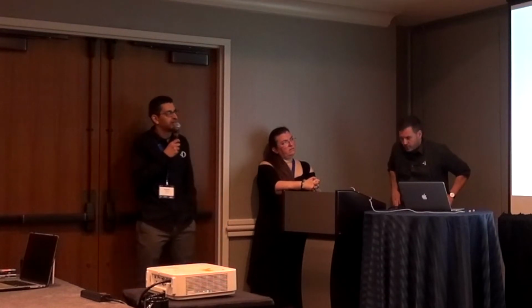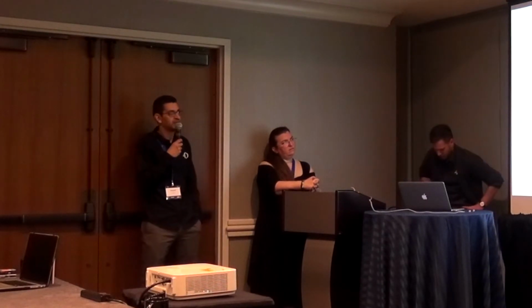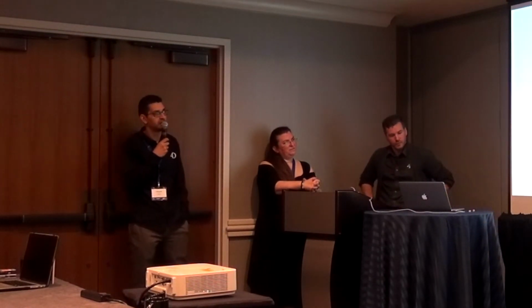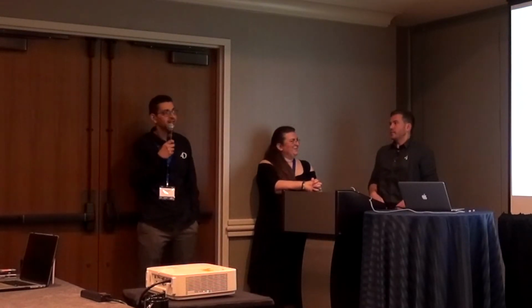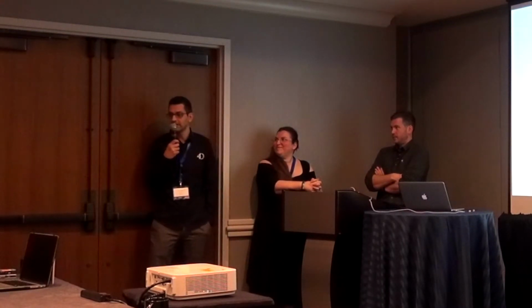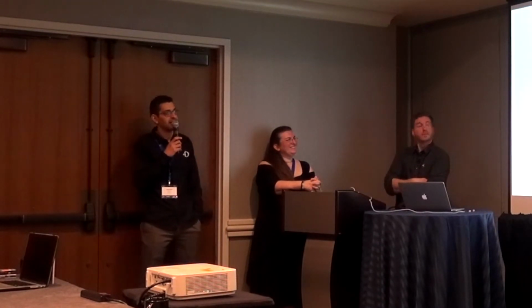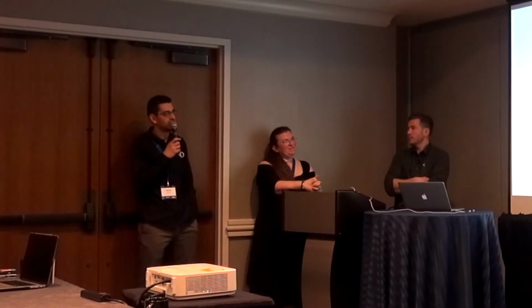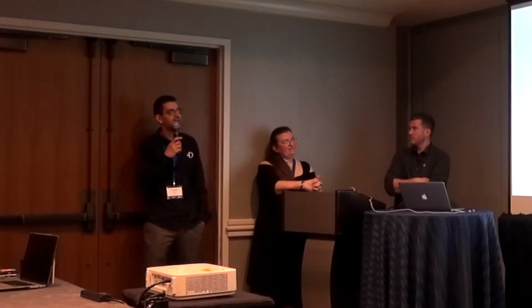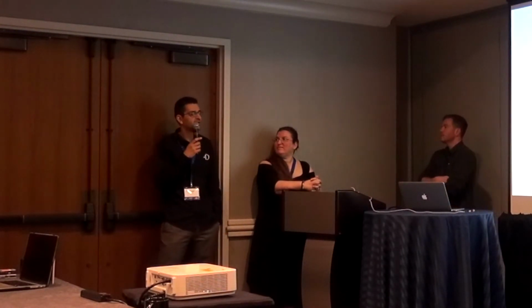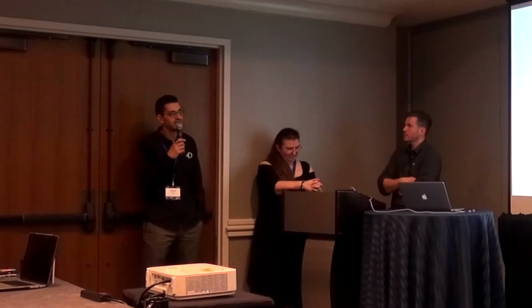So after that, when we have an exact idea about what we should do, we will design the solutions that will meet your needs. First, we will prepare a statement of work, which is a document containing the whole solution design, the resources that will work on the project, the deliverables, so all project details. Then, once we validate the document with you, we will organize a meeting with all project stakeholders to kick off the project. And we will give you access to our project management tool, Zoho, to allow you to follow up with us until the end of the project.